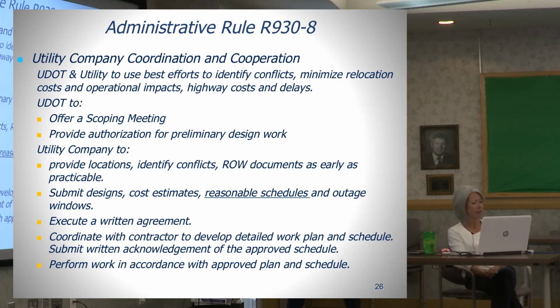Also requiring the contractor and the utility companies to develop and agree to a plan of how the work is going to be done. That's going to become significant as well when we go on through the rest of the provisions of the new rule.